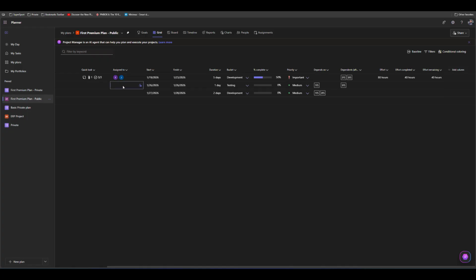If I put here, for example, myself, it will say 1 day is 8 hours, multiplied by the number of resources, it is 1, only me, 8 hours. If I put here, let's say, Ellen, then John, then myself, and then Jim, you will see I have 2 days, multiplied by 8 hours is 16 hours, multiplied by 1, 2, 3, 4 is 64 hours.